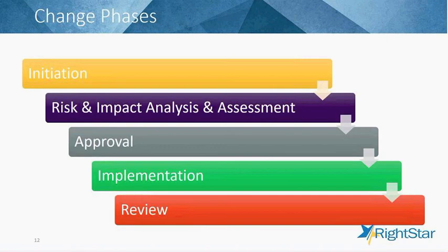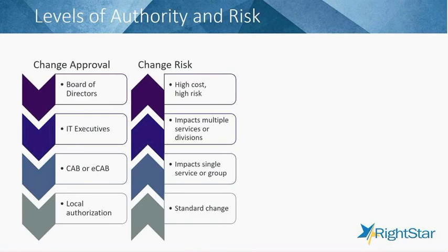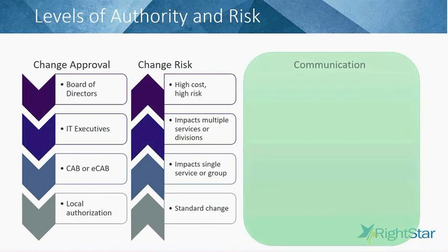So I'm going to skip a few slides ahead here. This is one of my favorite things, and when you've worked with ITIL as long as I have, it maybe seems silly, but I do have some favorite ideas from the ITIL documentation. There's this concept here where higher levels of risk come with higher levels of approval. Lower levels of risk, of course, push down the level of approval.